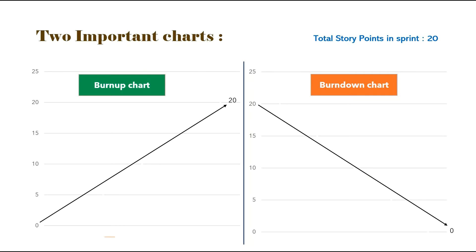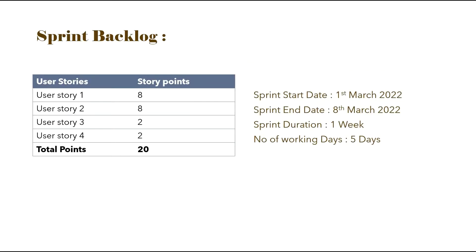This sprint can be measured using two important charts: the Burn Up Chart and the Burn Down Chart. In the Burn Up Chart, the count starts from 0 and goes up to the target number — in our case, 20 story points. But in the Burn Down Chart, the count starts from 20 and reduces down to 0. In this video, we will only learn about the Burn Down Chart and how it is generated for all possible scenarios based on team performance.